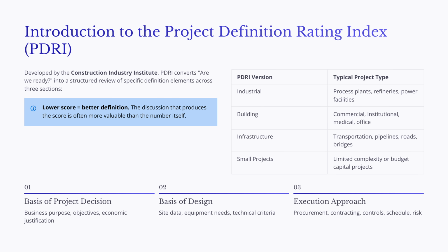PDRI is not a design checklist, and it is not a substitute for professional judgment. Instead, it is a facilitated planning tool. It helps the team identify missing information, discuss assumptions, and prioritize the gaps that create the greatest execution risk.